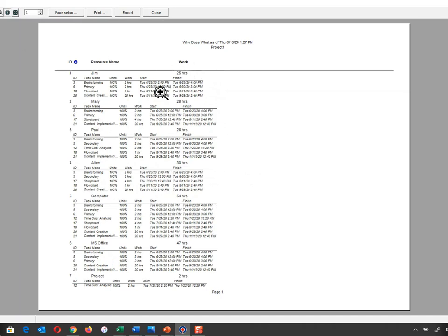Just to draw your attention to this, okay, at the moment I have Jim working 25 hours and maximum Alice working 30 hours. I will be looking at this because I'll be expecting each of your group members to be working in and around the same amount of hours. Okay. Now, to be quite honest, 25 and 30 hours is a big difference without being a huge difference. So just keep in mind that I will expect these numbers to be in and around the same amount. Okay. So I don't expect somebody to be twice the amount of somebody else, 68 hours for one and 30 hours for the other, or whatever the case might be, because that just shows that you're not managing your project as best you can.